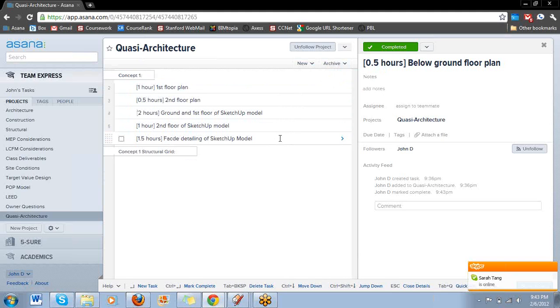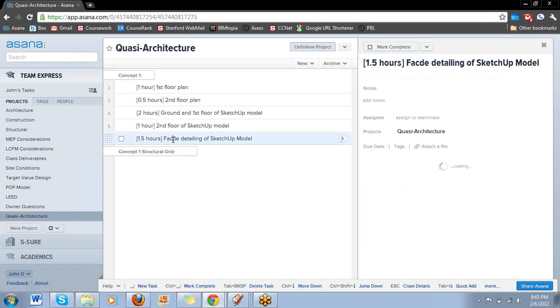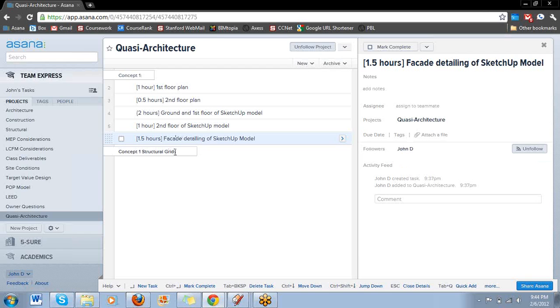And what I will do is, at the end of every week, I'll go through everyone's tasks that they've either completed or not completed. Let's say the task was due on Wednesday and it's still not done by Saturday when I go through it, then I'll note that. But what I'll do is take all the tasks we've completed and put them into a streamlined spreadsheet form. That will put us further down the road when we need to compile all this data in May for our presentation.